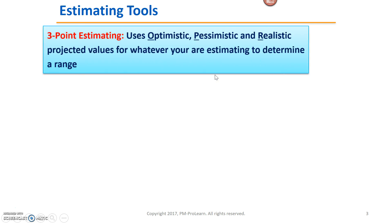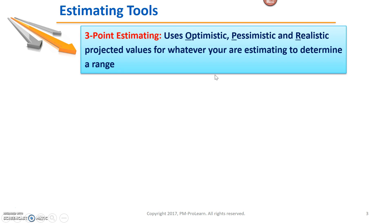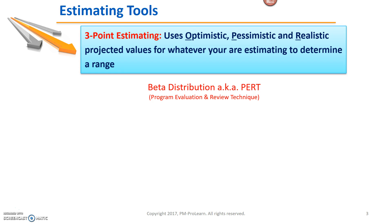Let's look at the estimating tool of three-point estimating. It uses optimistic, pessimistic, and realistic projected values for whatever you're trying to estimate in order to determine a range. Optimistic, pessimistic, and realistic could also be called best case, worst case, and most likely. We're going to use those three points to do what's called a beta distribution, also known as PERT, which stands for Program Evaluation and Review Technique, and come up with a range.